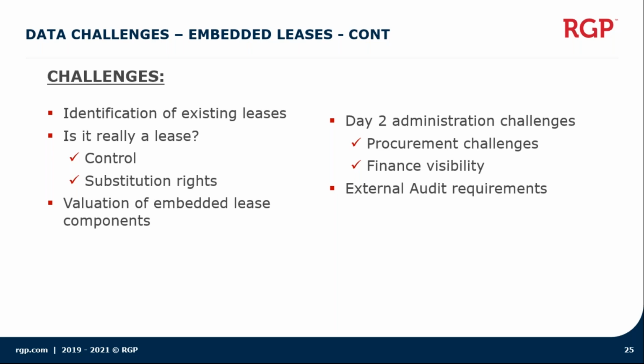When we think about that scoping process and the embedded lease process that Jason walked through, you wouldn't want to begin data collection until you have completed some of that work, again making sure that you're not gathering more data than you ultimately need. And the last piece there is external audit requirements.